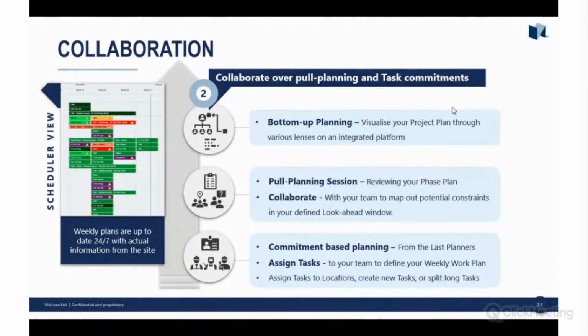So that way we can have a measure at the end, when we measure percentage plan complete (PPC). How many tasks did someone commit to doing in a week versus how many they actually did? So it's a measure of the plan. So either the commitments aren't being realistic or someone's just not getting that work done that week. Either way, it's a tool for helping people to understand that and getting everyone back on track and getting efficiency up as much as possible.